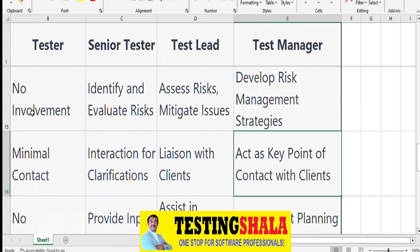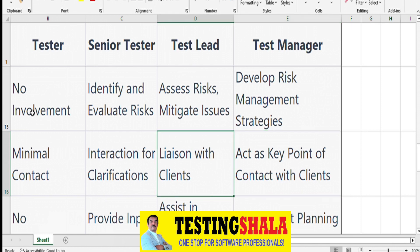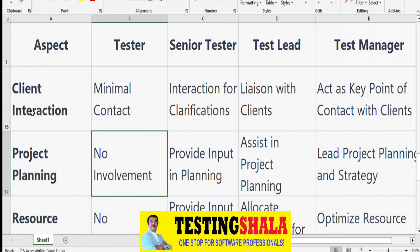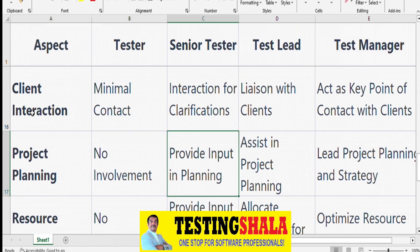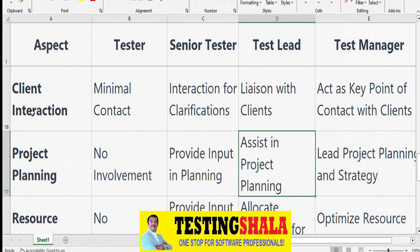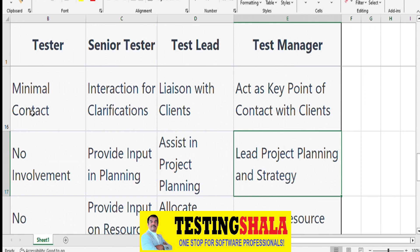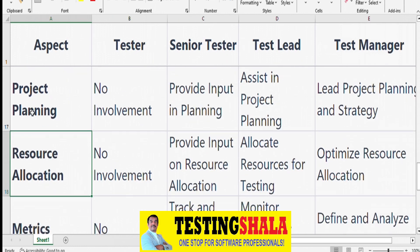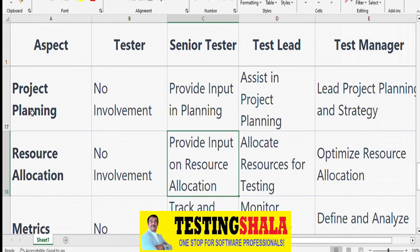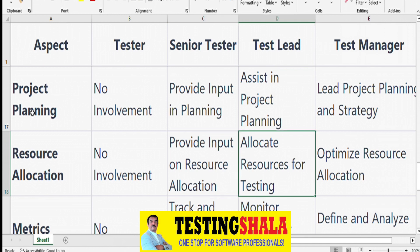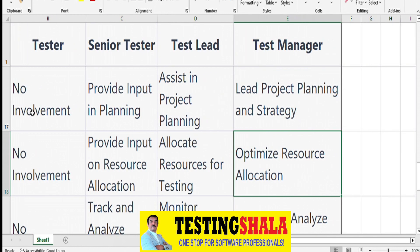From a project planning perspective, testers don't do any planning. Senior Testers provide inputs to planning. Test Leads assist in developing the project plan for the Test Manager. Test Managers put together the right test plan and test strategy. On resource allocation, testers are not involved, Senior Testers provide effort estimates based on complexity, and Test Managers optimize resource allocation based on inputs from Senior Testers and Test Leads.